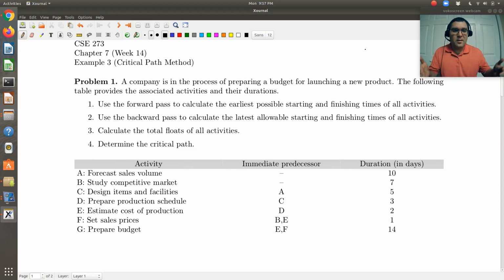And then in the second step, I'll essentially take that network but replace the nodes, which are just circles labeled as the activities, and I'll use the 3x3 grid, which is recommended in the text. The first row will contain information with regards to the earliest possible starting and finishing times. The last row will contain information on the latest possible starting and finishing times. The middle will be the activity, and then next to it will be the float, which we'll calculate in the end.